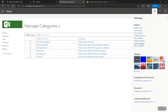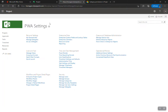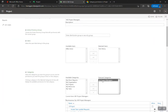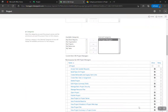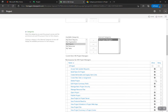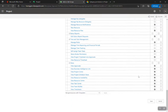Now with my category created, I'll go back to my group 'MS Project Managers' to review it. I can see the group name and the category has been dynamically linked. You can adjust the category here, but I always adjust it in the category itself because there are a few extra options there — like which views it applies to. If you want to restrict editing to own projects but allow viewing others, create a second category with view-only permissions for those other projects.